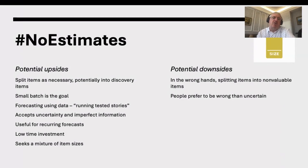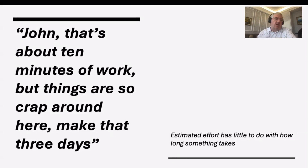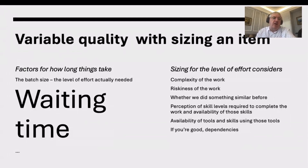So is estimation dead? What's the disparity between sizing and how long work actually takes? A colleague once said to me, 'John, that's about 10 minutes of work, but things are so bad around here — make that about three days.' There's very little correlation between estimated effort and how long something takes. There are many reasons things take a long time, and the one factor most people don't consider is waiting time, which is a real problem.